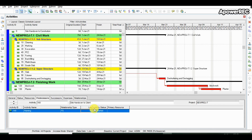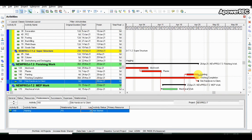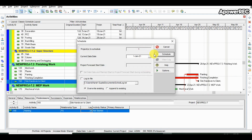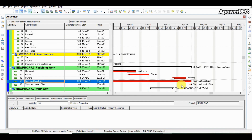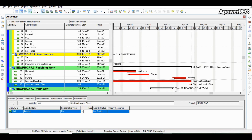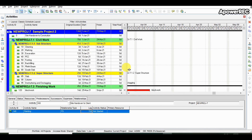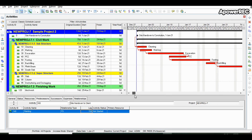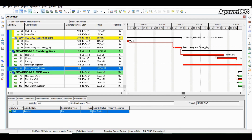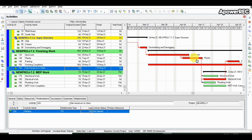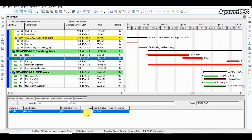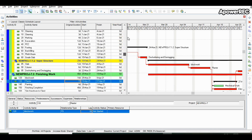Now we check the lag. Handing over of site after completion of painting cannot happen the next day — let us keep 15 days. So after scheduling it, our site handover date shifts accordingly. Lag is to be provided considering local site conditions. For block work and plaster: if we consider the same mason gang or space constraint, we cannot start plaster until block work is completed, so we keep the relationship as finish-to-start. Our end date is coming to 19th May.